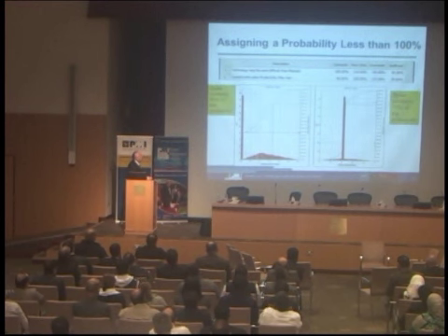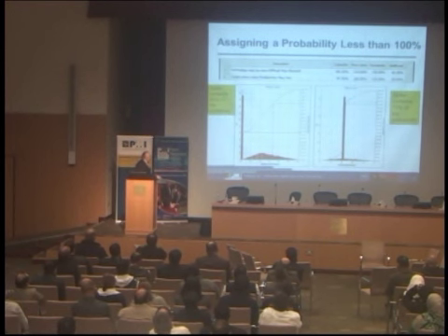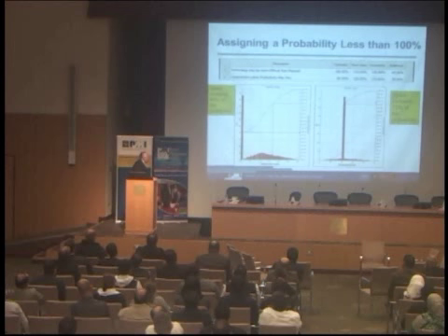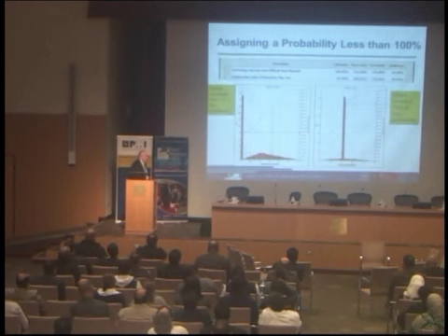If I've got a 60% risk, there's a 40% probability that that does not occur. I'm applying it to an activity that's got 100 days duration, just to show you how it would work. At 100 days, I've got 40% of the probability. The other 60% is in this triangle here where the risk has occurred.